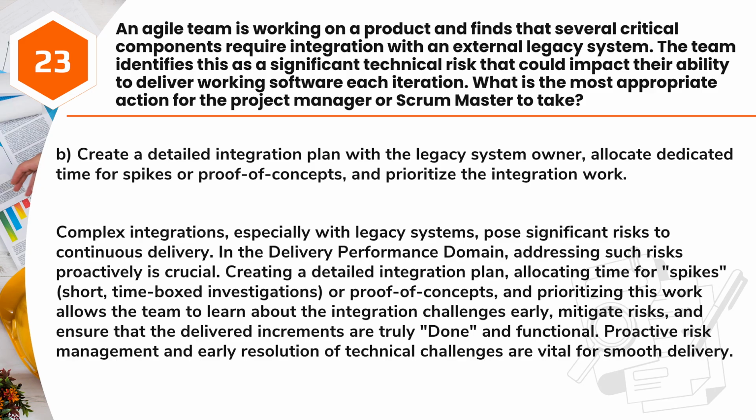Creating a detailed integration plan, allocating time for spikes, short, time-boxed investigations, or proof of concepts, and prioritizing this work allows the team to learn about the integration challenges early, mitigate risks, and ensure that the delivered increments are truly done and functional. Proactive risk management and early resolution of technical challenges are vital for smooth delivery.